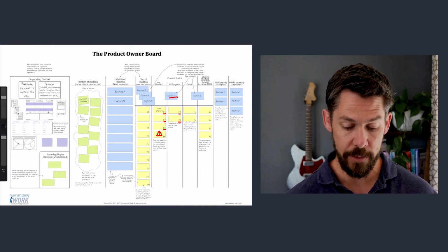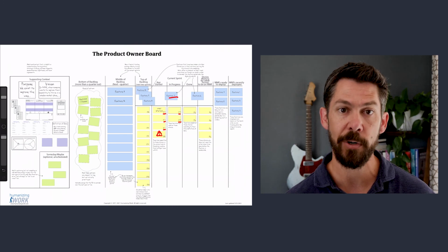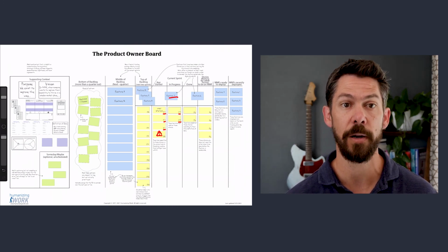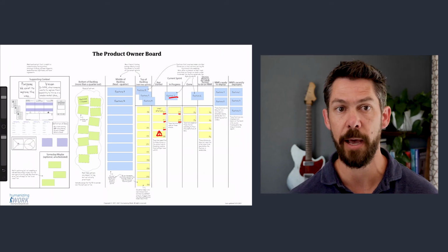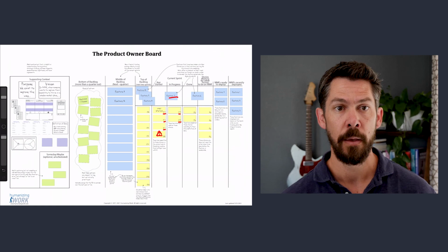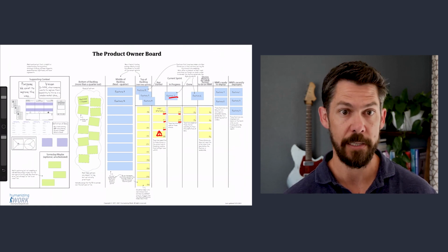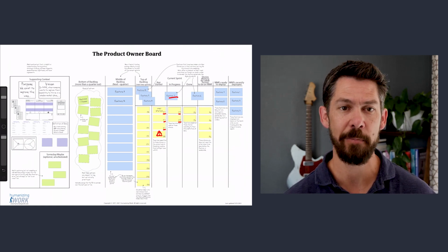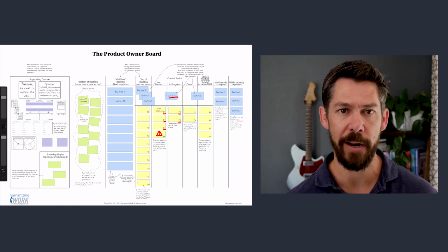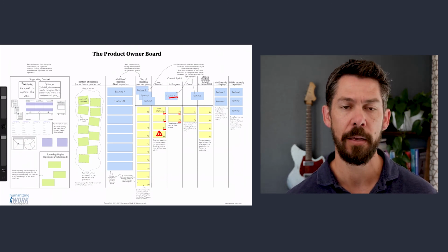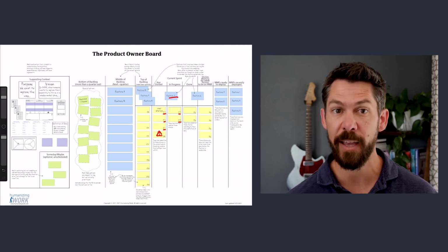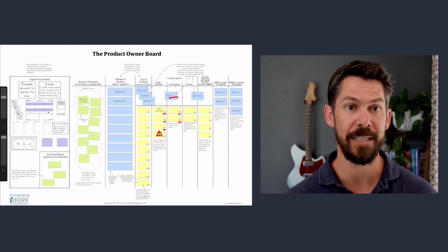And then finally, there's this someday maybe box sitting at the bottom of the supporting context. We found it useful sometimes to visualize the things that we're not doing right now. They're intentionally not on the backlog. And this may include things that are waiting on something else to happen in the world. Like maybe you've got cryptocurrency payments as a thing you could do one day, but it's not widespread enough that it's really worth putting on your backlog. So it sits there to represent, we know about this. Maybe we'll look at it every quarter and see if it's time yet, but it still sits there.